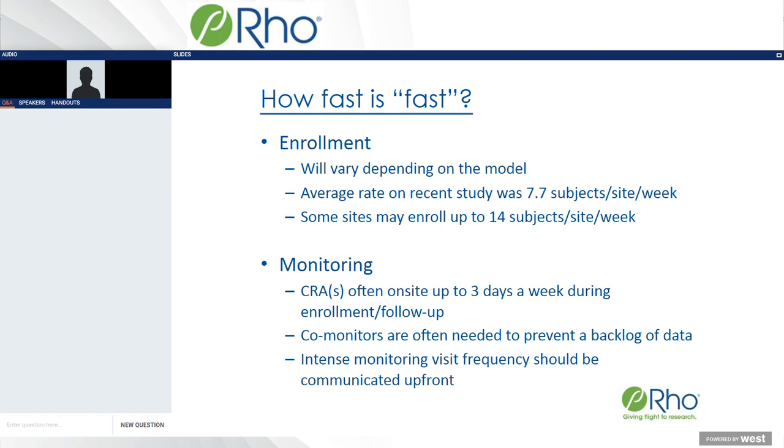So it's pretty intense monitoring, and this frequency needs to be discussed with your sites. The planning of how often and how many people will be on site should be discussed up front with everyone involved, and so there's lots of implications. Your sites need to know that so that they can schedule appropriately and have the space for those monitors, have the staff that can interact with those monitors. But also, when you look at your budget, do you have enough budget for these visits, for the amount of visits and the intensity of those visits, which relates to the resources that you're adding to your study? So a few different perspectives there.